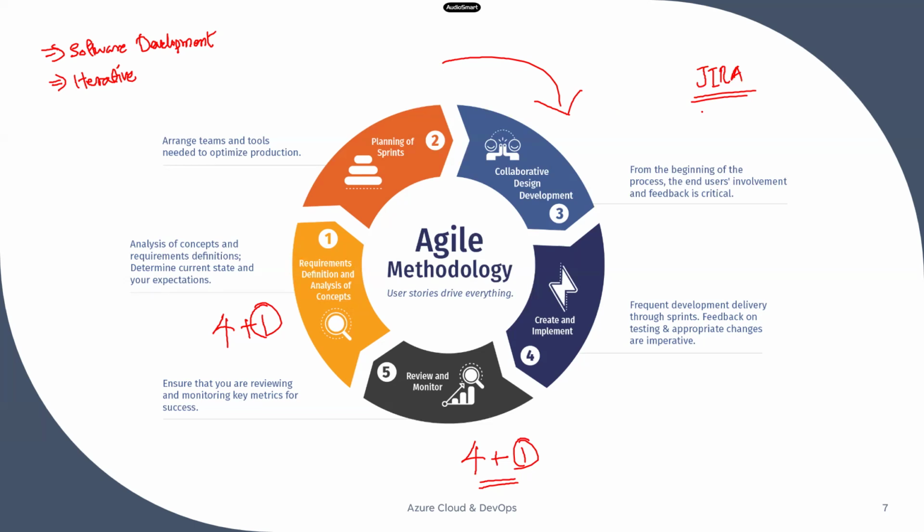Because for example, if we are building a house, we can easily monitor how much work is done, whether it is till the belt, or the foundation, or if it is a 2 tier, then the 1 tier is done. We can easily follow that because we can see it, right? But in software development, how can we see that? We can't, because that code will be residing in someone's laptop or in some repository, some storage. So we can't easily identify that.